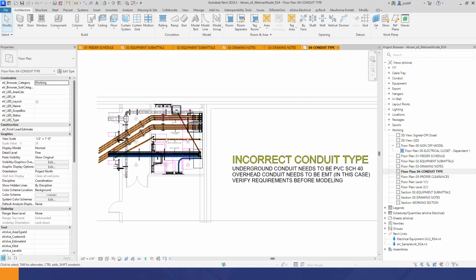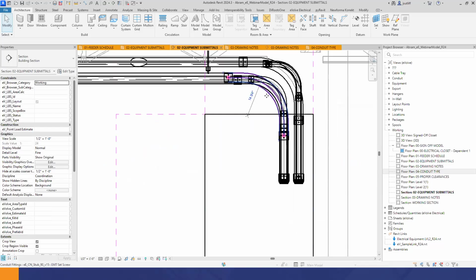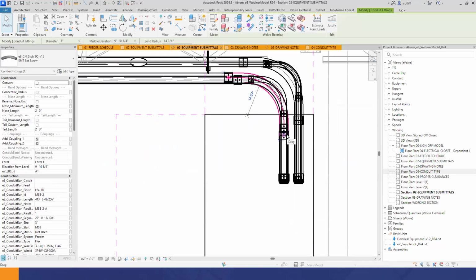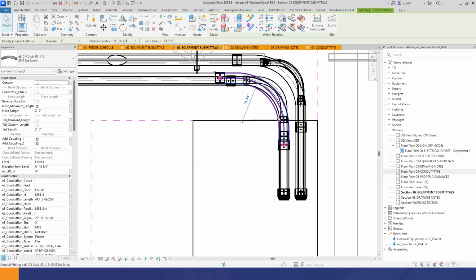You do make a good point because a 400 amp panel with 42 breakers isn't really going to change all that much. Right. Gear can change quite a bit, and depending on the height of the gear, that can change a lot of things as well. Like in our equipment submittals, we've got our radiuses of our coordinated racks. Well, they're not hitting the top of the gear anymore. We can't actually install this.